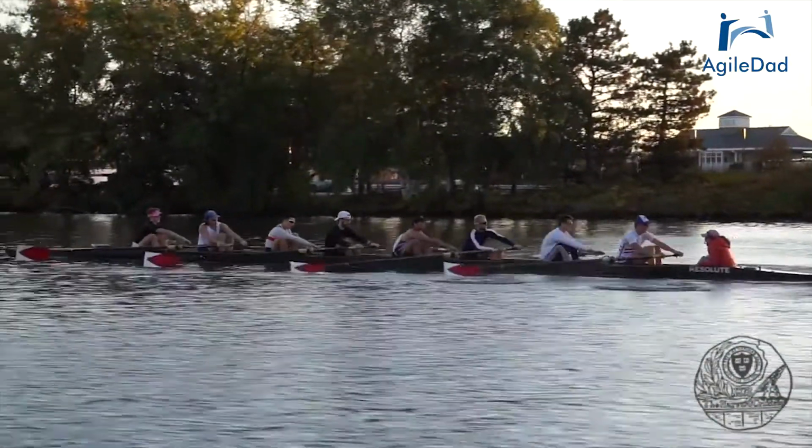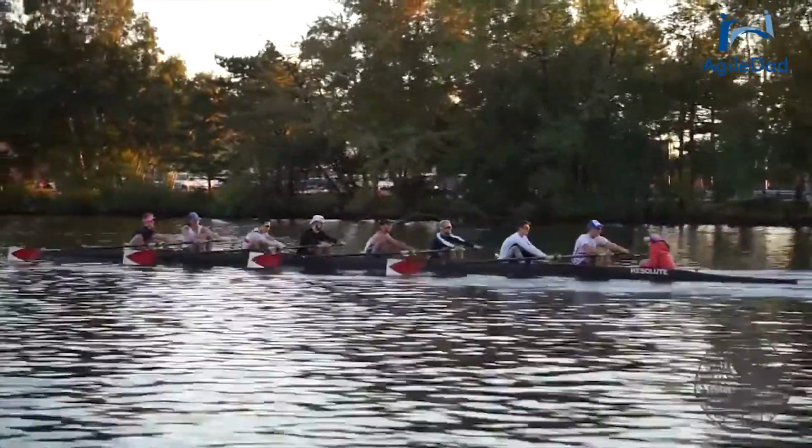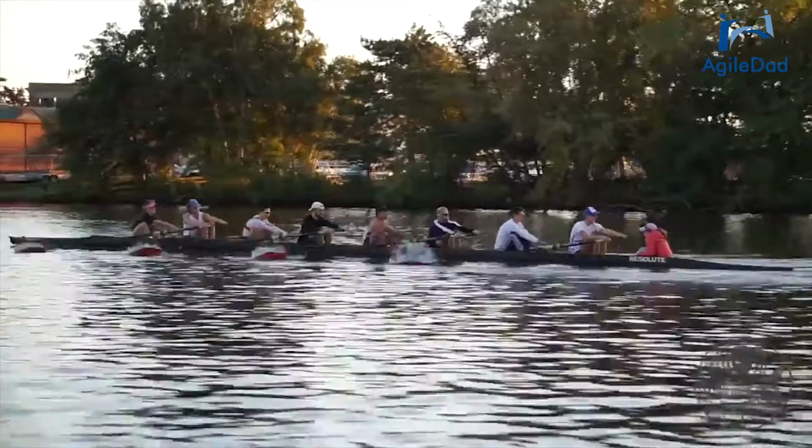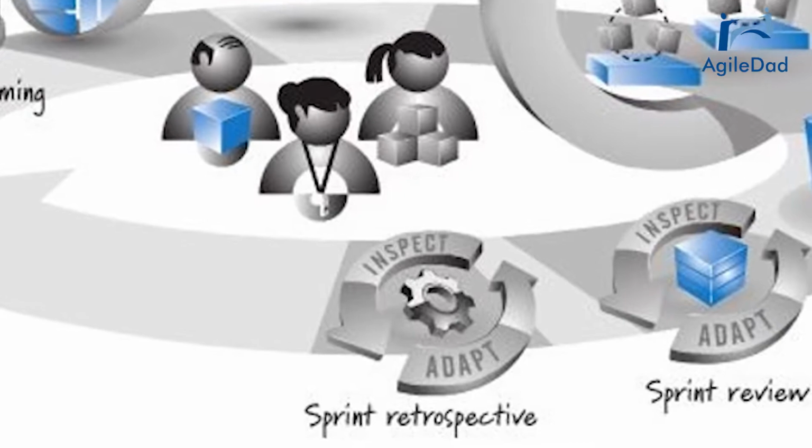So, let's look at the time frame here. This is 30 to 60 minutes at least. If it takes longer, it takes longer. We want to make sure we're encouraging participation from everyone involved in the team, so then the team has an opportunity to make sure their voice is heard. Well, one big thing we have to look at is we're encouraging that inspection and adaptation that's going on with the team. This is not getting very product specific. This is getting very process specific.